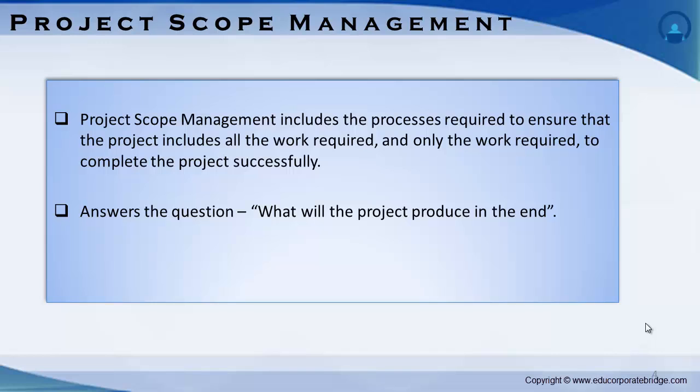During the planning phase, changes to the scope will have more of an impact on the schedule and cost, because they will probably require added planning. This additional planning will require people resources and extra time to make adjustments to the plan.